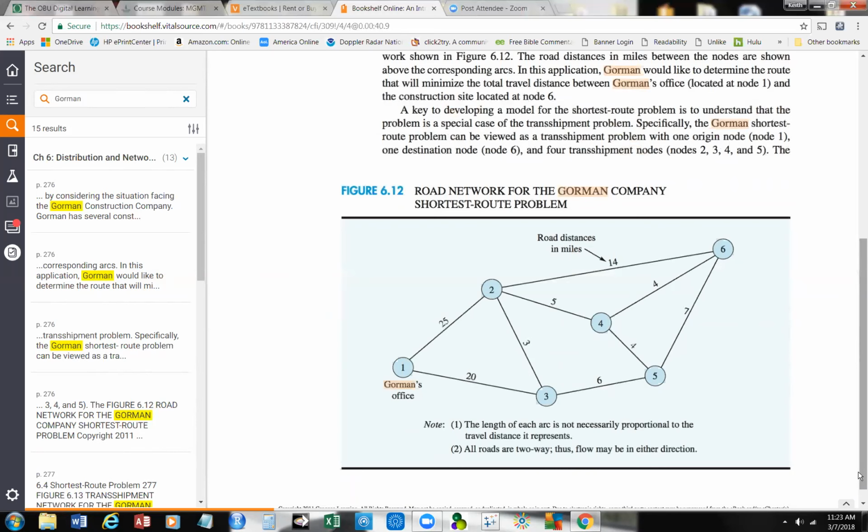The idea of the critical path method is we try to identify the pathway or the set of arcs between nodes that is the longest or the most expensive, so that if we can bypass it, or if we can not bypass it, but if we have other approaches where we can use slack resources, we do that.